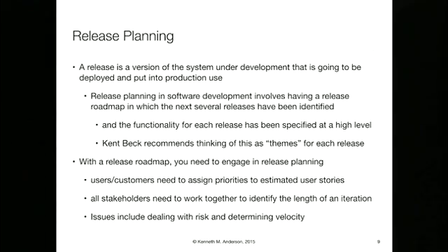So you don't do the assessment for the points in each iteration, you only do it at the beginning of the project? So at the beginning, what you do is you say, okay, what's a good guesstimate for what our velocity is going to be? And then you're going to do, as I'm going to discuss, release and iteration planning based on that guess. So you might say, okay, 30 points per iteration, and we need to plan out 4 iterations. So we take all of our things and we say, here's the highest priority stories. Those go into iteration 1, up to 30 points. The next set of stories go into iteration 2, always sorting by priority if we can. And we'll do 30 points for that, and 30 points, right? But that's just your initial guesstimate, okay?